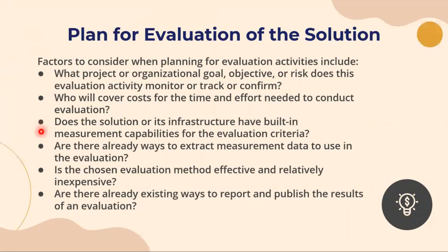Does the solution or its infrastructure have built-in measurement capabilities for the evaluation criteria? Are there already ways to extract measurement data to use in the evaluation? Is the chosen evaluation method effective and relatively inexpensive? And lastly, are there already existing ways to report and publish the results of an evaluation? So these should be considered when planning for evaluation of the solution.